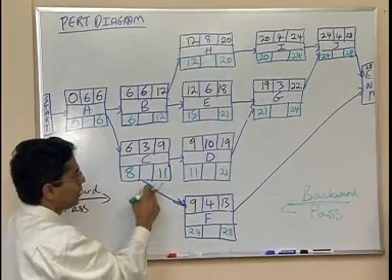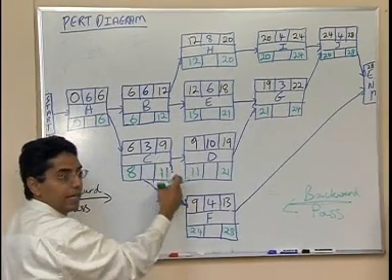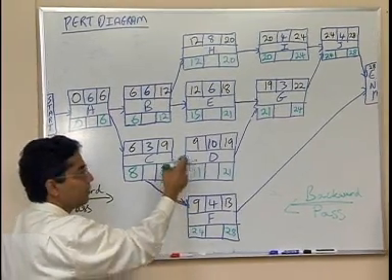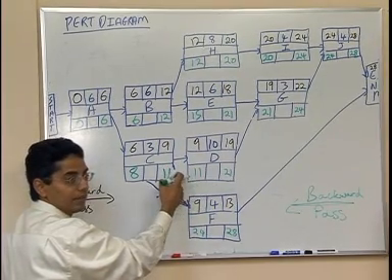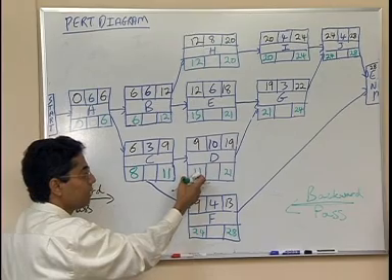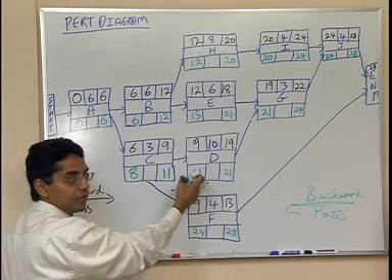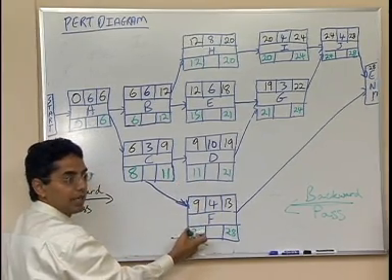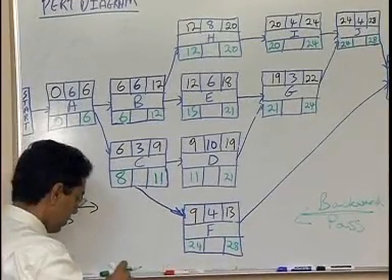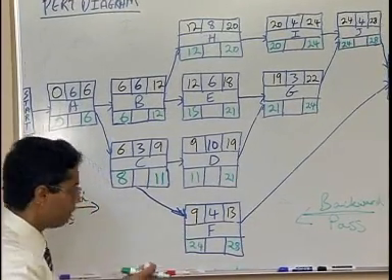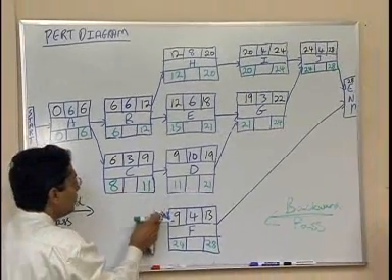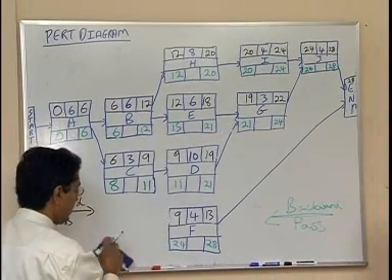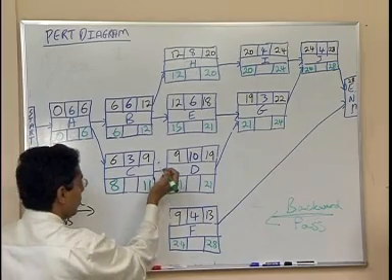When I'm looking at the right hand side, I only see one arrow. In this case, I would have been okay because I would have chosen 11. But if this was the larger of the values, I would have missed the smaller value. So it's very, very important that you make sure that all your arrows come from the right hand side.